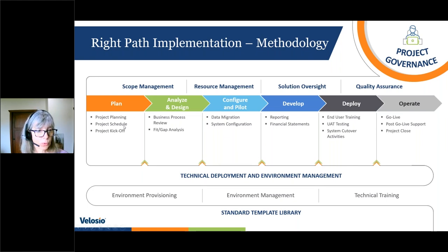So we start with the plan, and the plan is the project planning. That's where we look at your scope. We take our templated scope or our project plan and then adjust it for any uniquenesses within your project. And then we schedule a project kickoff, and that kickoff would be between our project team and your project team. It would introduce whomever you invite to that project kickoff to the project, the timeline, the communication strategy, the team members. So you'd be introduced to our team, to your team.